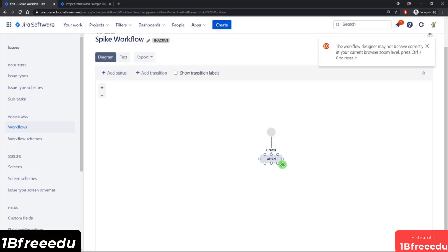So once the ticket is pending, it's in the to-do state. Then, whether it's research or investigation, once someone starts working on it, it can go into an in progress state. And once the work has been completed, it can be marked as done. So essentially just three statuses: to do, in progress, done. Once again, it is a very basic workflow. I do not want to overcomplicate the first workflow that we create here, but don't worry, I will try to have some examples of more complicated workflows later in the course, probably in the bonus and example section of the course.